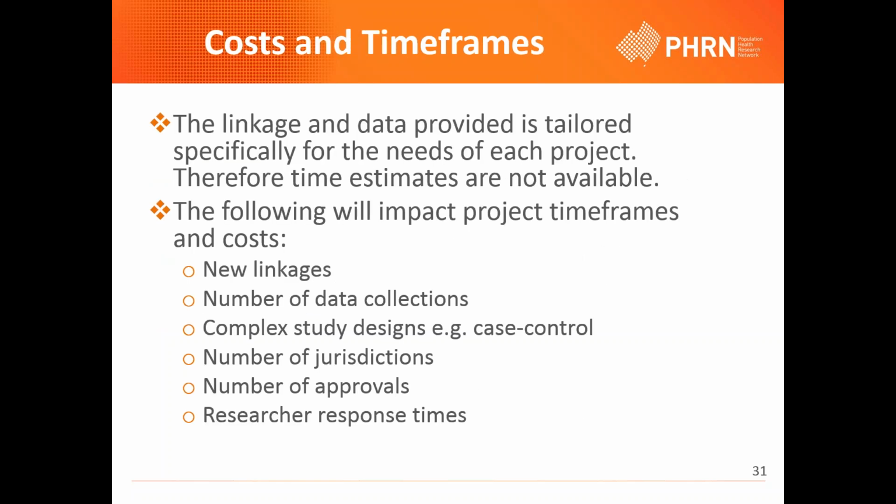Okay, so costs and timeframes. It's always a good idea to get a request for quote early on in the project, so you've got an idea of how much this project's going to cost you. Quite often people, if they're applying for grants, will ask for a quote, and then if they are successful with the grant, will put in the expression of interest or application further down the track.